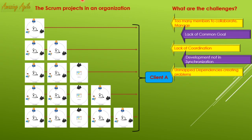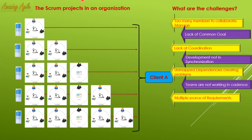Unmapped dependencies create problems. With multiple sources of requirements, each project team works on its own without discussing dependencies or discrepancies with other teams. Each project has its own product backlog, so there is a chance of duplicated requirements or ambiguity across projects. You may end up delivering the same requirement twice, wasting time. That is the biggest challenge.